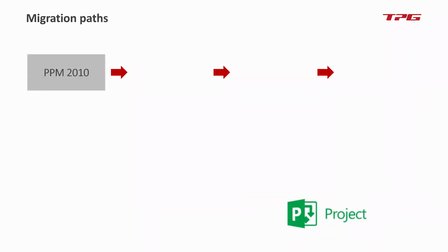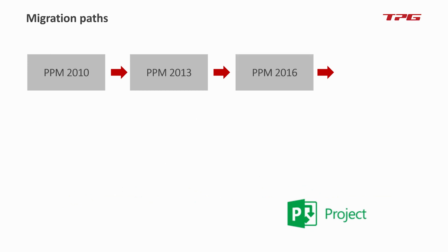So where do we start? Let's say we start from Project Server 2010. Maybe I want to go to 2013, first step. So we need to install 2013 in parallel. Then you take the databases, copy them over to the new 2013 system, and let them migrate automatically by Microsoft. On premise, all this is done by automated scripts. So that could be the final version.